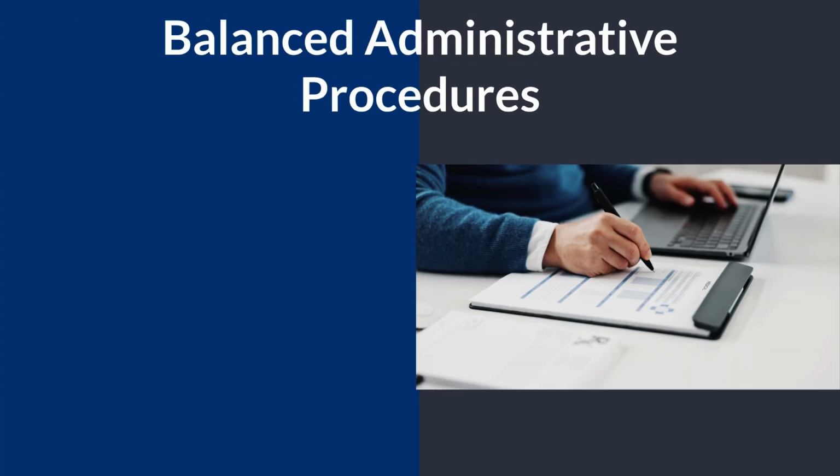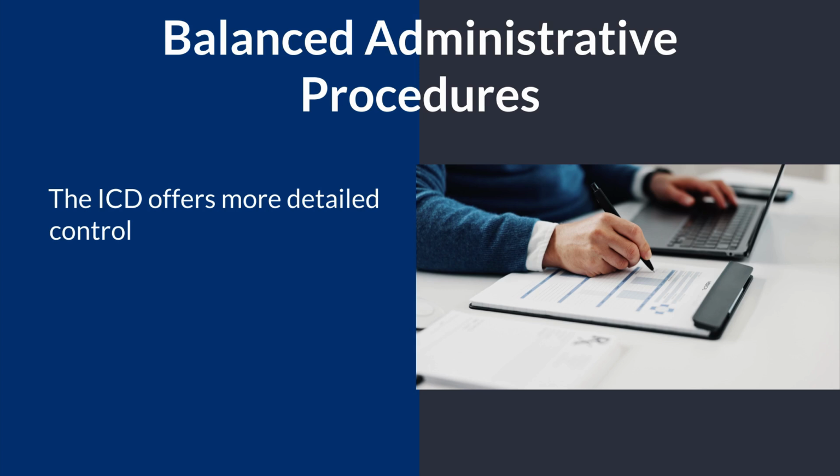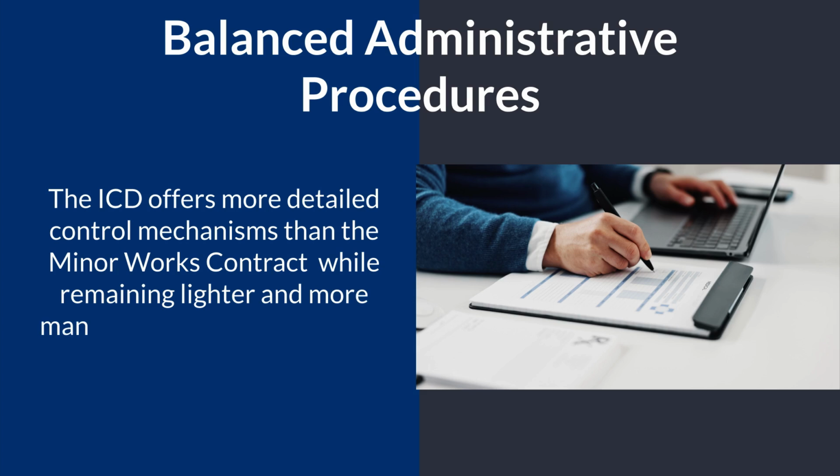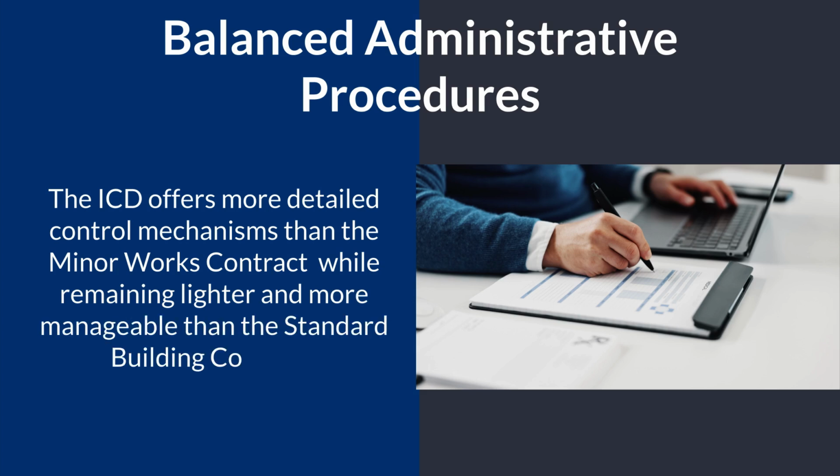Secondly, the ICD offers more detailed control mechanisms than the minor works contract, including full variation processes and loss and expense procedures, while remaining lighter and more manageable than the standard building contract. This makes it particularly attractive for QSs seeking clarity without unnecessary administrative weight.